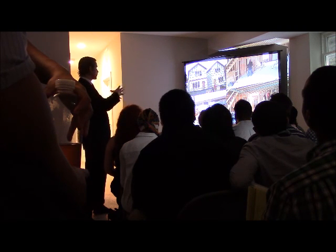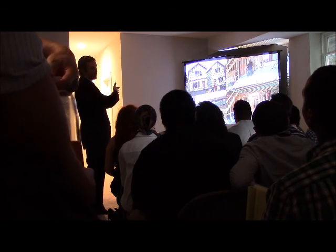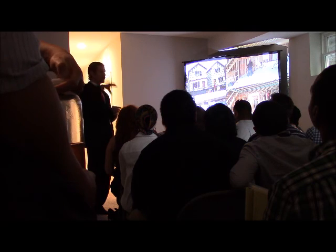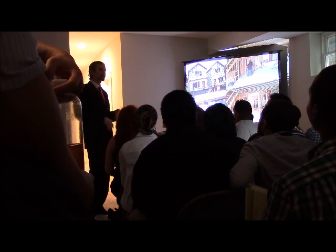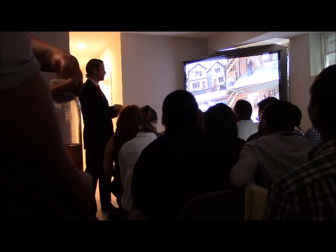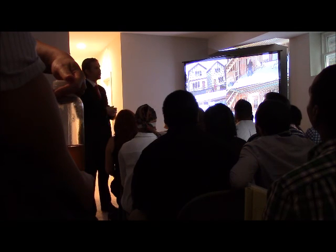And this whole yard really became a mess when it gets wet, because having this awesome yard was a great thing for the buyers, but for doing the work, it was a mess. They park in here to get stuff in, and it just tore up that yard. So having that extra long lot was actually a challenge for us. At one point we had to put down plywood, but stronger than that, so that trucks can pull over the mud.